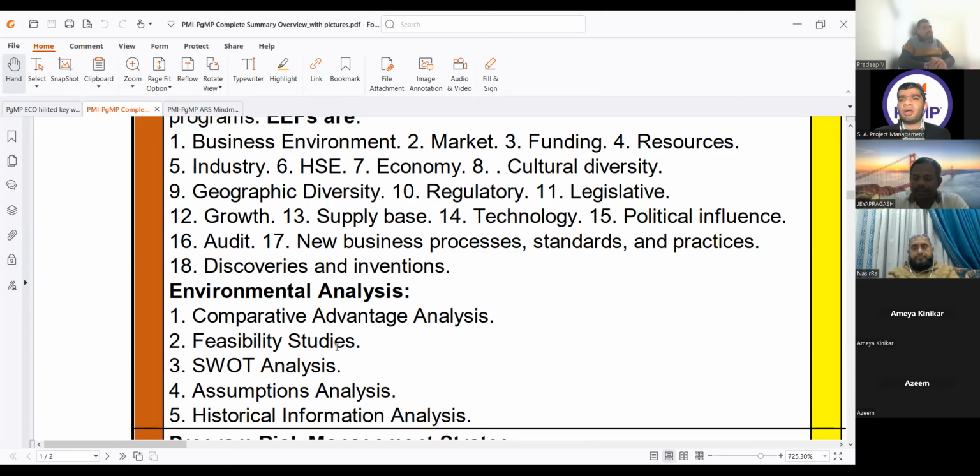If you look at our government organizations, for example in Pakistan or any other country, you will see feasibility analysis for 20 hydropower projects, but till now only 5 are executed. Why? Because the feasibility studies were done, but they found some problems that it is not 100% feasible at this moment to initiate this program. Number one. And secondly, they will do the priority analysis. I have 20 options available, but which one has 100% probability to be fulfilled? Once 1 is okay, 2 is okay, 3 is okay, then you may start programs 4, 5, and 6 later on, taken from the feasibility analysis and studies.